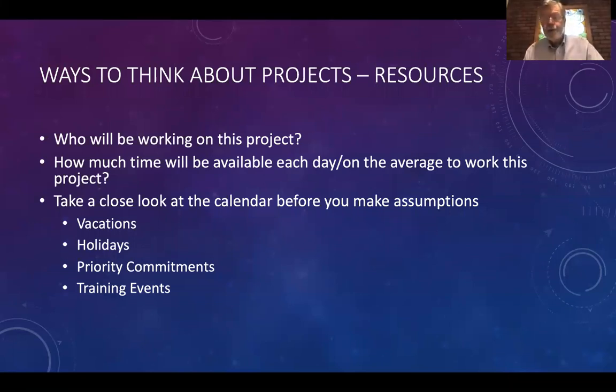Try to get anything done in Singapore during the Lunar New Year. That's also a very difficult thing to do. So be aware of holidays, of vacations, of the people and the resources that you're going to need, and try to estimate the amount of time that they have realistically when you add them into your project.